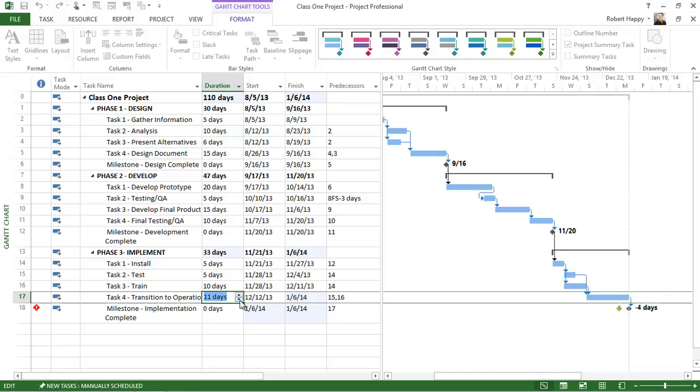Sometimes you might even find yourself on the other side of that deadline where you're actually ahead of schedule. So it is possible to make changes to your schedule and adjust your schedule. Now you won't be able to do this unless you took the time to set up your network and see the impact of these changes immediately. So following our process, you can have a very effective tool, and then you could take advantage of setting a deadline and seeing if you're early or late past your deadline. And if you're past it, Microsoft Project will calculate your total slack as a negative value.